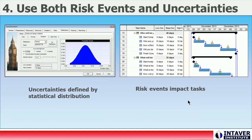Step 4: Use both risk events and uncertainties. While most project managers understand that Monte Carlo simulations measure the impact of risk on plans, the source of this risk is often misunderstood. Risk in projects comes from two sources: risk events and uncertainties. Both types of risks should be added to the risk model to increase the validity of the simulation.